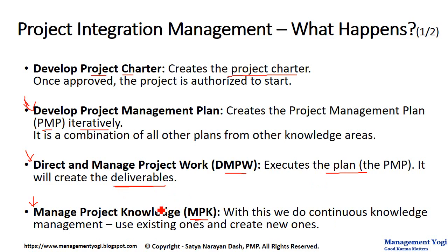The deliverable acts as an input because many times deliverables will have codified knowledge, or knowledge will be codified into the deliverables. And also the project management plan will be acting as an input to the process of MPK. And the key output of MPK will be the lessons learned register. The lessons learned register will contain the lessons learned throughout the life cycle of the project or the phase. So the lessons learned register, or LLR, is first created in the MPK process, and it is updated throughout the life cycle of the project.